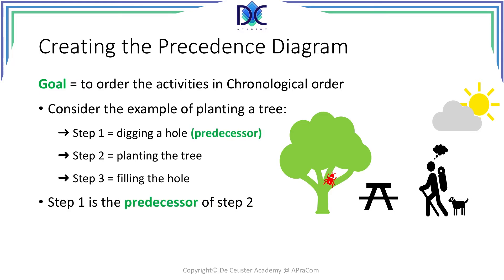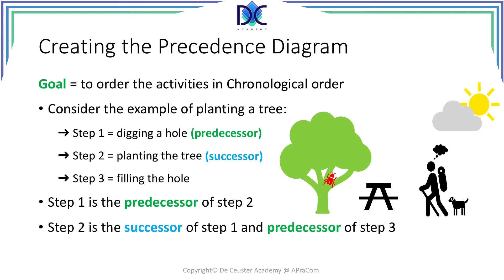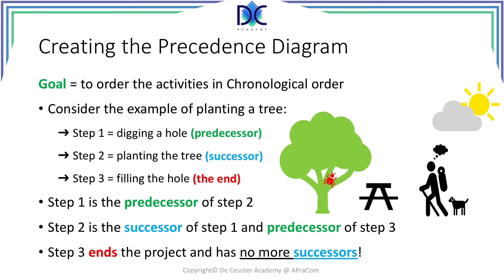Step 1 we call the predecessor of step 2. Step 2 is the successor of step 1, but it's also the predecessor of step 3. Finally, step 3 ends the project and there are no more successors. The project can start with activities that have no predecessor — step 1 has no predecessor. And the project ends when there are no more successors: when we fill the hole, all the work is done and the project is finished.